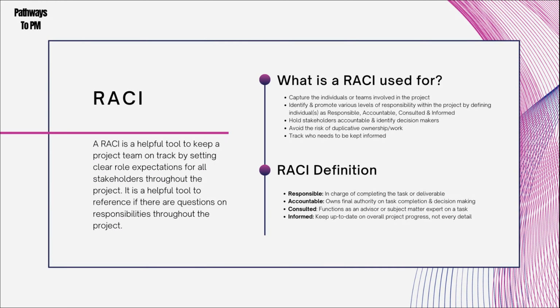I've had a situation in one of my projects where some individuals were added to the project team later. They didn't know who I was. They had a different point of contact all throughout the project. And so when I reached out to them, I was like, "Who are you?" But when you have a RACI, you can always provide it to new team members for them to know who is who and to show the responsibilities of anyone on the project team.